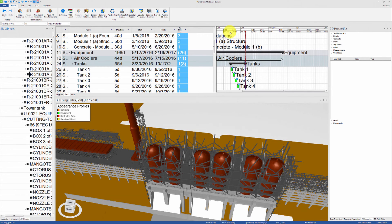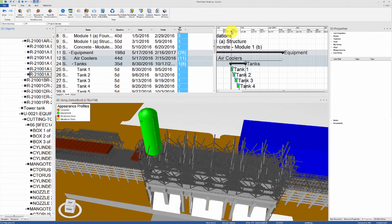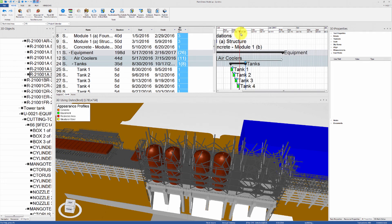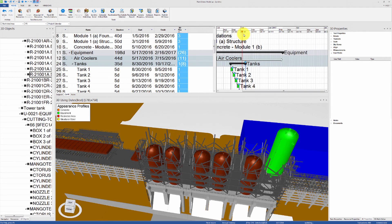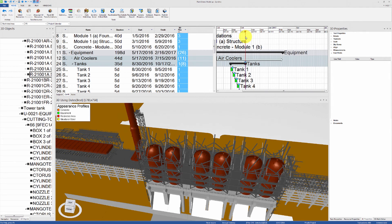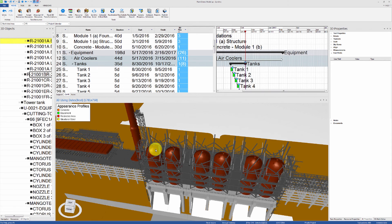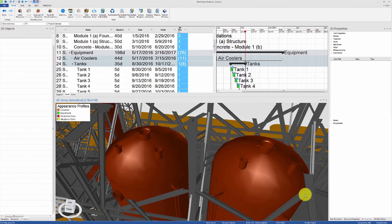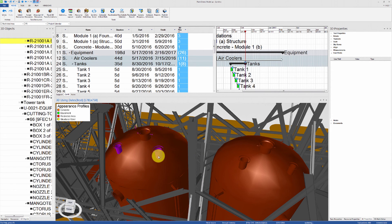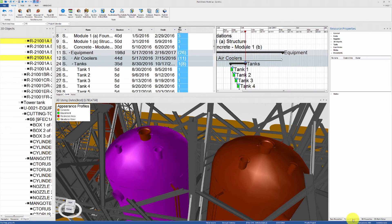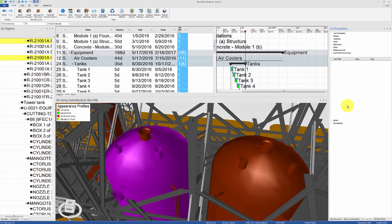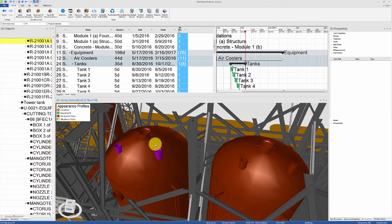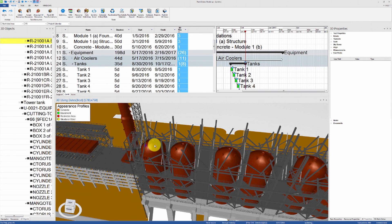Notice that the tank will still be lowered in place as one 3D resource, but that you can still select supports individually in the 3D view. What happens now is that the whole tank will be treated as one element in the resource properties tab, and a set of 3D subparts in the 3D properties tab. This means that the tank will be treated as a whole in any 4D operation, but that you can still examine the element properties of each subpart.